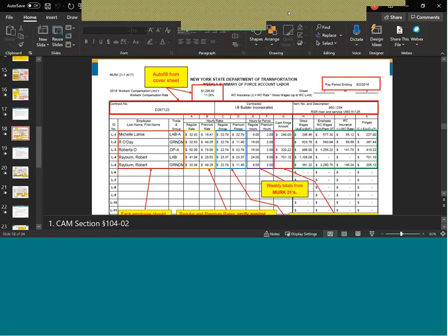And if the whole force account is piecemeal, unless it carries on for months, the entire force account is not going to be all that expensive. If you're just working at it here and there, a few hours here, a few hours there, that's not going to add up to much. The cost benefit of us trying to track down small excess of workers' comp paid is, we'd be in the red, for sure.